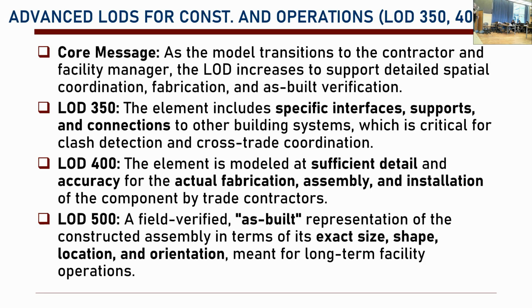So with LOD 400, we basically know everything about building that element. We know how to create this window in the field. This is LOD 400. LOD 500 is after the building is completed. After that projector is put into place, we have the model from LOD 400. It says that it's coming from there, but in reality it came from over there.